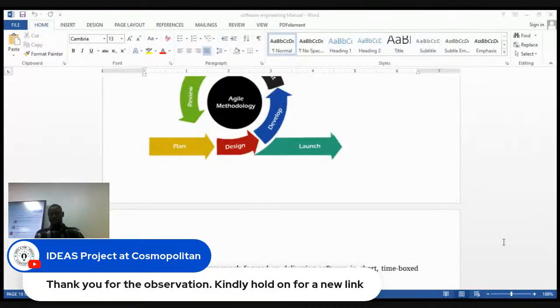So when you're talking about agile, you said that someone has to collect feedback from users steadily when working with the agile model. Do other models need feedback from users? No, other models do not make room for that. What they make room for is the user requirement. When you're gathering it, that's when you ask questions. And again, when you are testing, you test it within you and your organization. Any other fault that's found out will now come under maintenance. So that's what is different with agile.